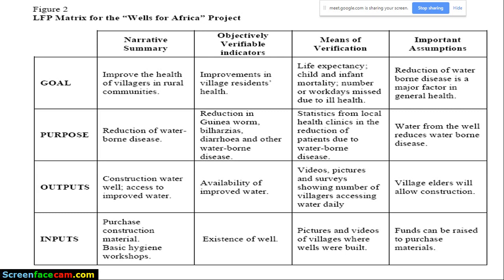So it means we want to be tracking the availability of improved water, and that's an indicator. We are just going to be reporting on this indicator. Remember, when you start filling out your M&E plan, which I shared with you, we've covered almost 90% of the components in an M&E plan. You are going to state how frequently you are going to be reporting on that indicator. Is it after 3 months? Is it after 6 months? If I say I'll be reporting on this indicator after 6 months, right after 6 months, I have to collect information on the availability of improved water and report on this.